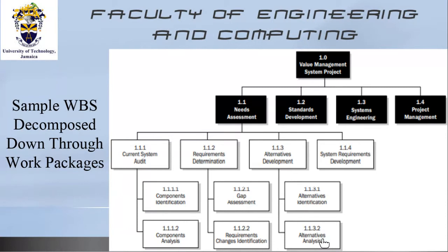package. I wonder if everybody sees where I'm going, how you can cost your project and also indicate the duration of each of these work packages. And that is how you truly determine the cost of your project and the schedule of your project and the resources needed by you going down to the work package levels. If you don't do that, you can only guess the cost of your project. So it is very important that we spend the time to develop the work breakdown structure, to create it and to analyze the details in the work packages.